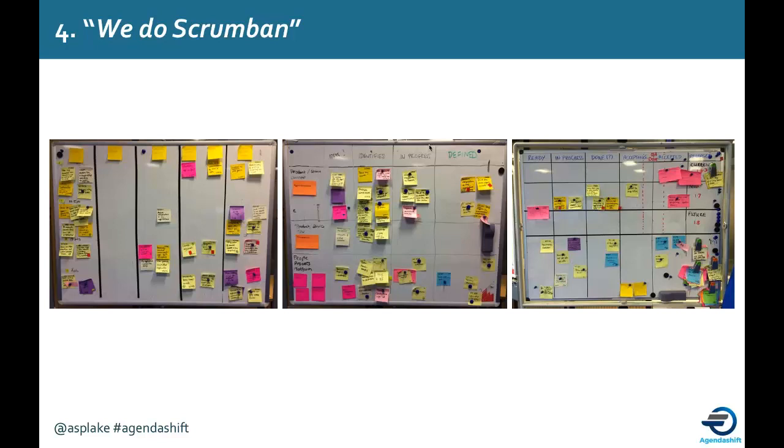We've taken horizontal slices across this story map to loosely plan out the next few sprints. I say loosely because we know exactly what we want to deliver in the next sprint, but what we're going to deliver in subsequent sprints is always up for negotiation.